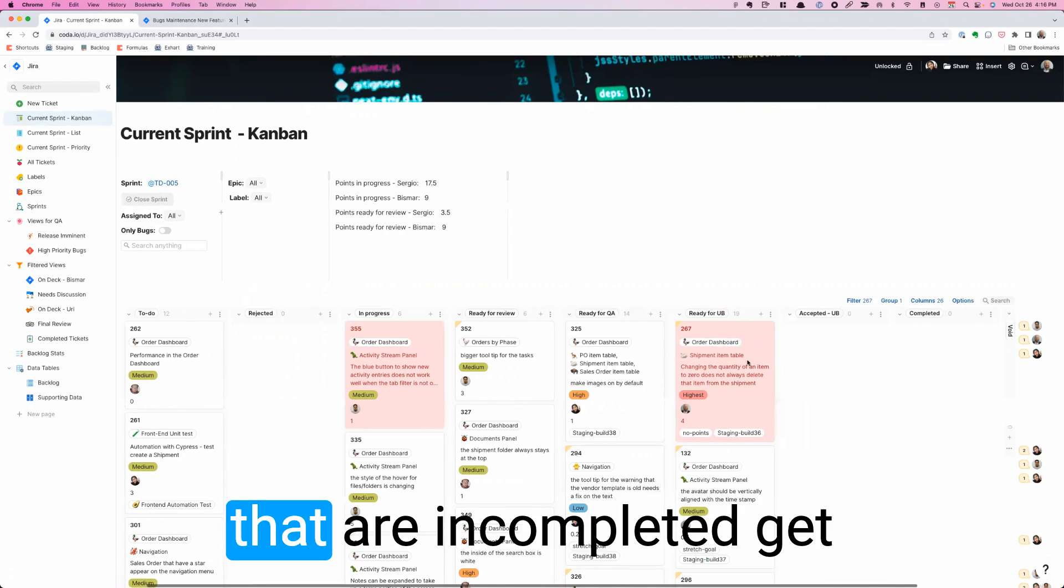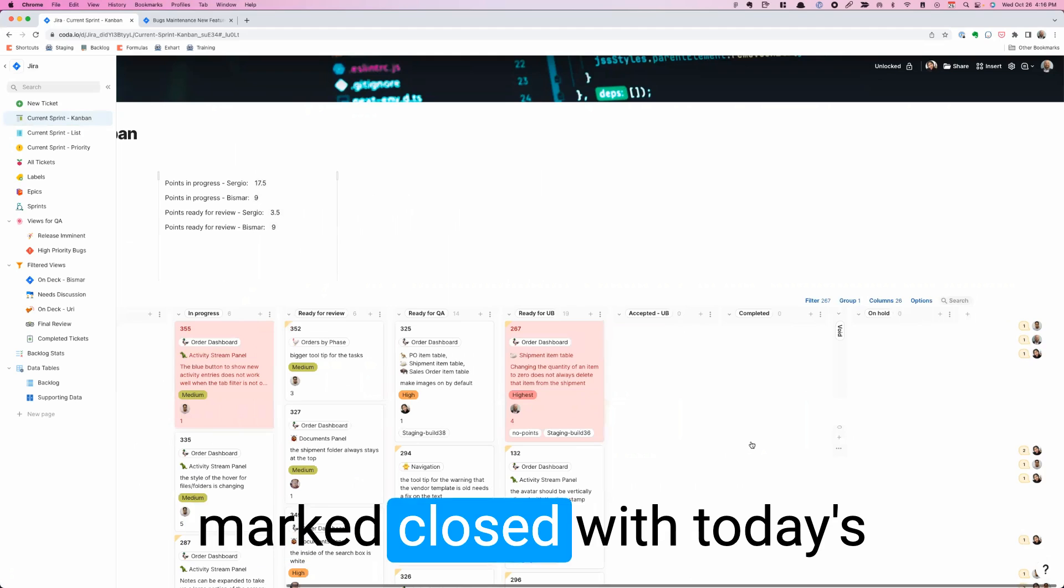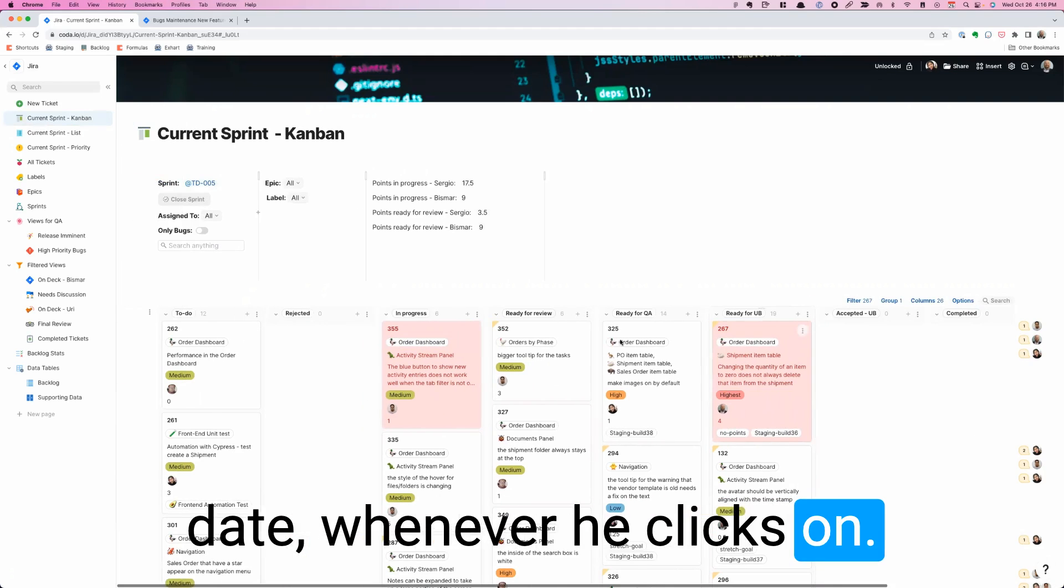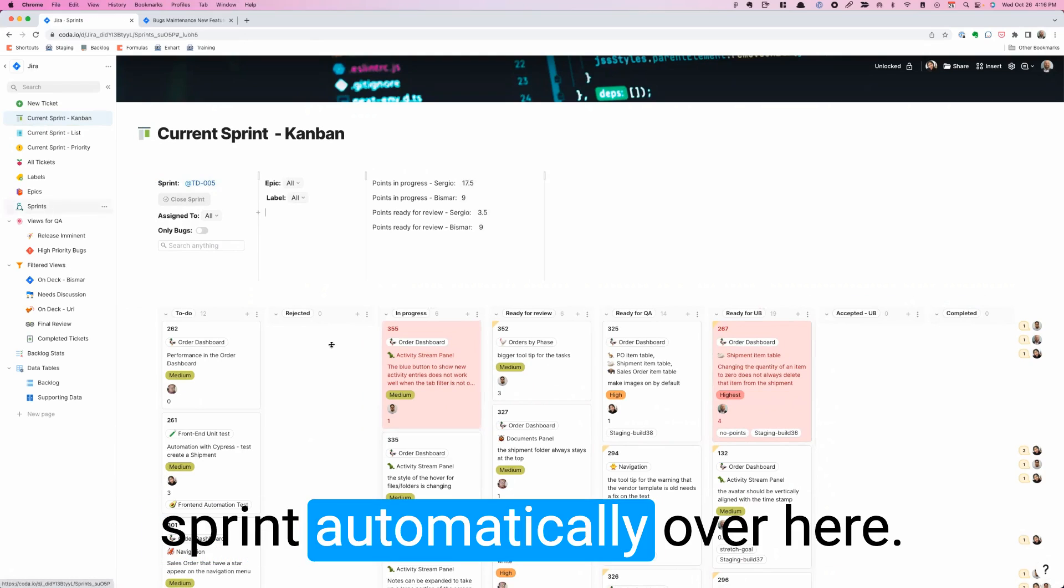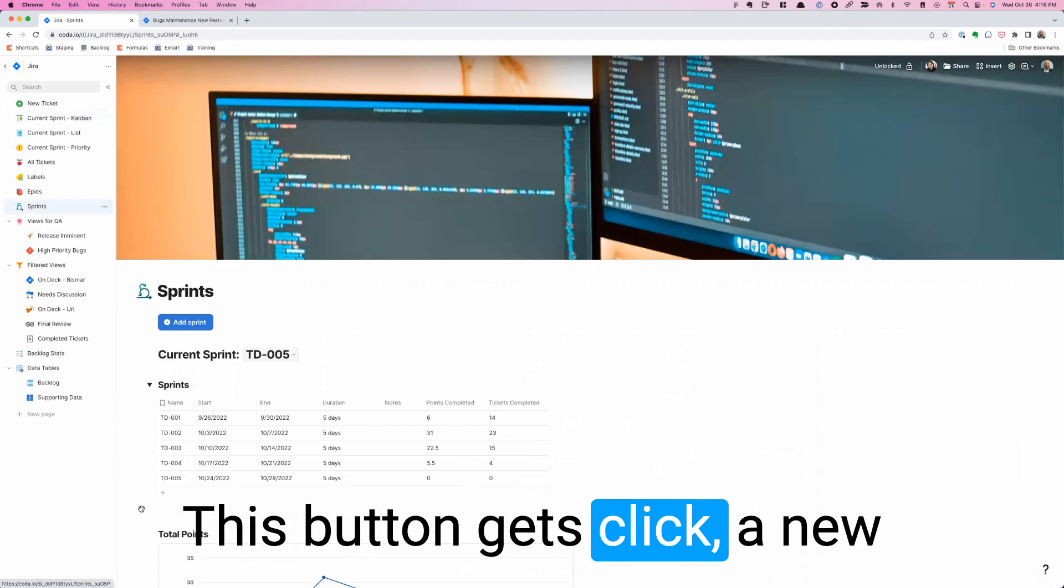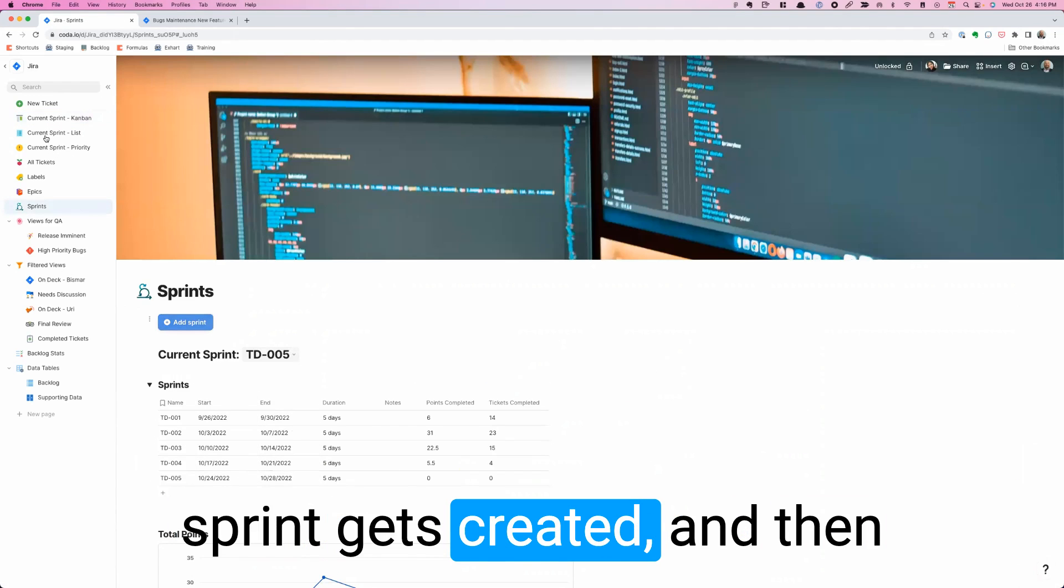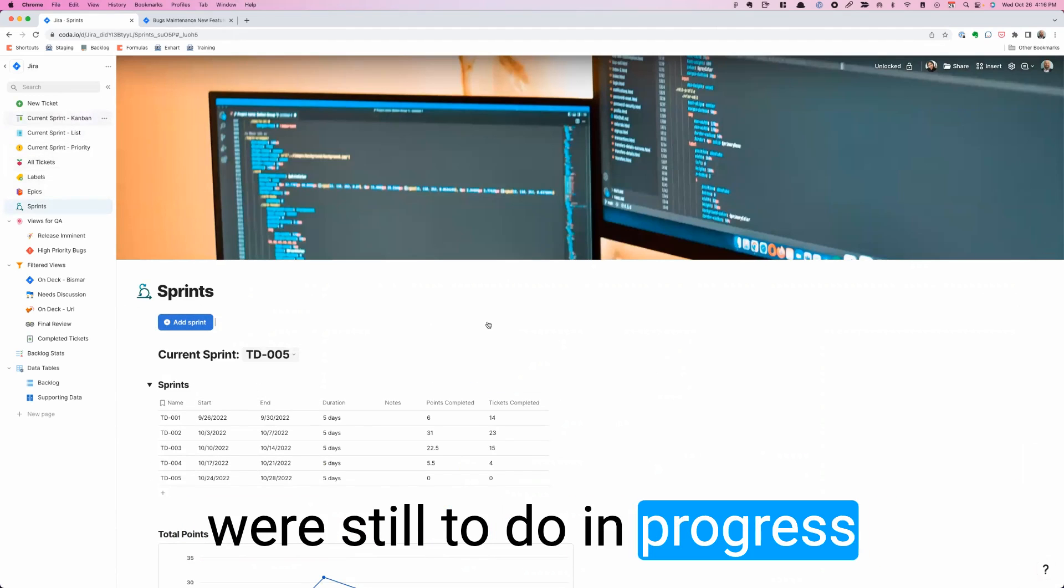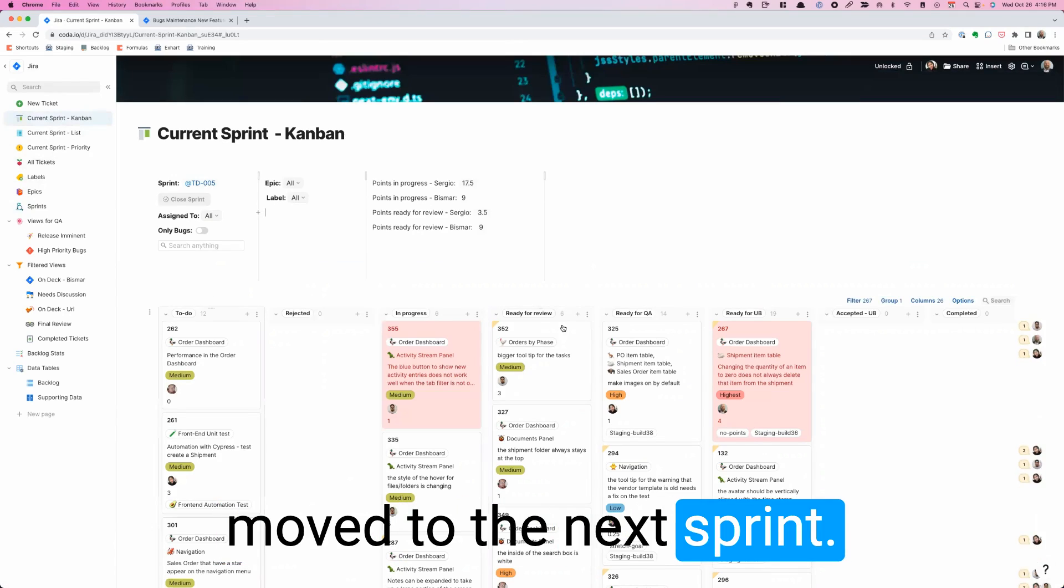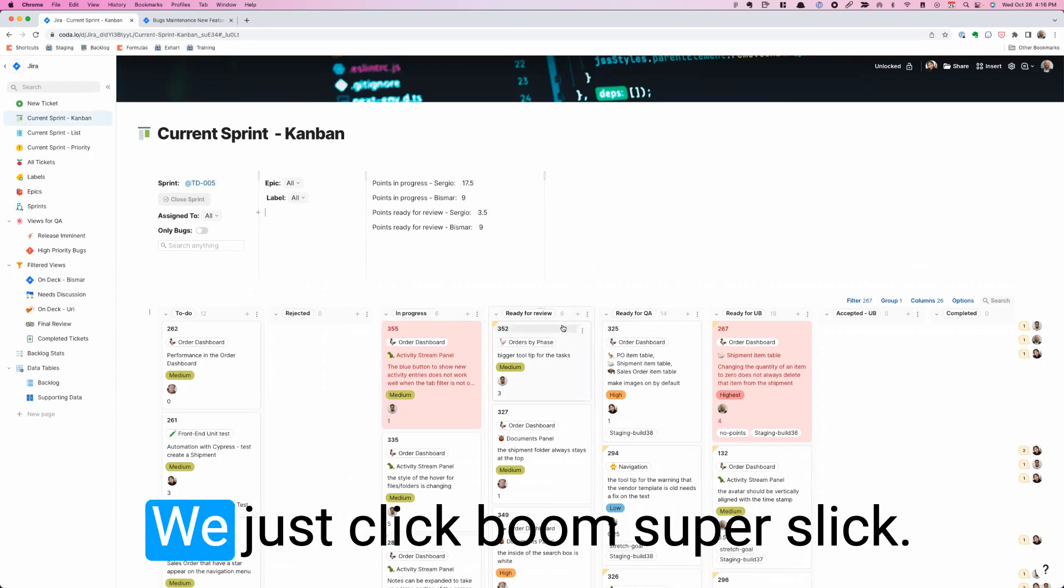When he clicks on this button, all the tickets that are uncompleted get marked closed with today's date whenever he clicks on that. And then we create a new sprint automatically over here. This button gets clicked, a new sprint gets created. And then over here, all the tickets that were still to do in progress or ready for review get moved to the next sprint.